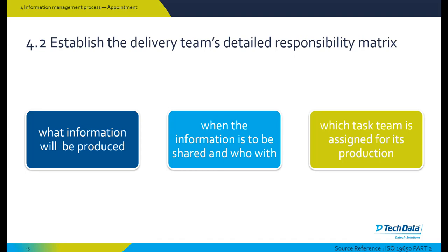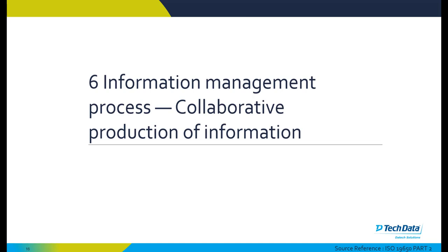At stage four, establishing delivery team's detailed responsibility matrix: what information will be produced, when the information is to be shared and who with, and which task team is assigned for its production.